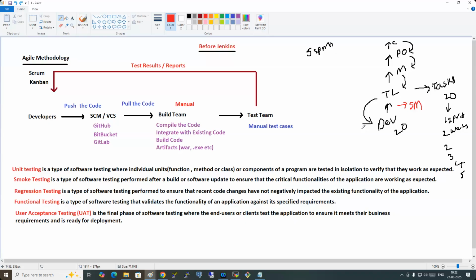And the Scrum Master will also scold him like this. Every day morning at 9 o'clock, a 15-minute Scrum call will be there. Everyone must join the call, and everyone has only 1 minute to talk. In that 1 minute, every person needs to tell what you have done yesterday and what you're going to do today. Two things all the time: the update of yesterday's task, and what you're going to do today.